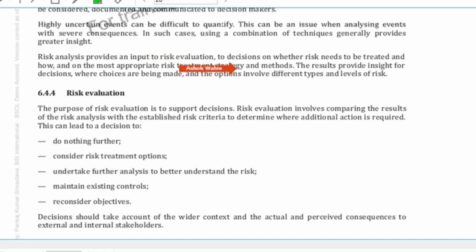Now this is where we answer your question. You have considered everything. You've taken the views of the employee, the cab driver, the vendor, the facility manager, and everybody involved. Now you have to take a decision. What is going to be the strategy? You already have an SLA, but it is not being met. So with a combined effort, you will see how best to reduce the likelihood and the impact. Only when you consider all these parameters, and do an Ishikawa model and the 5 whys, will you come to know what your strategy and treatment should be to lower the risk.